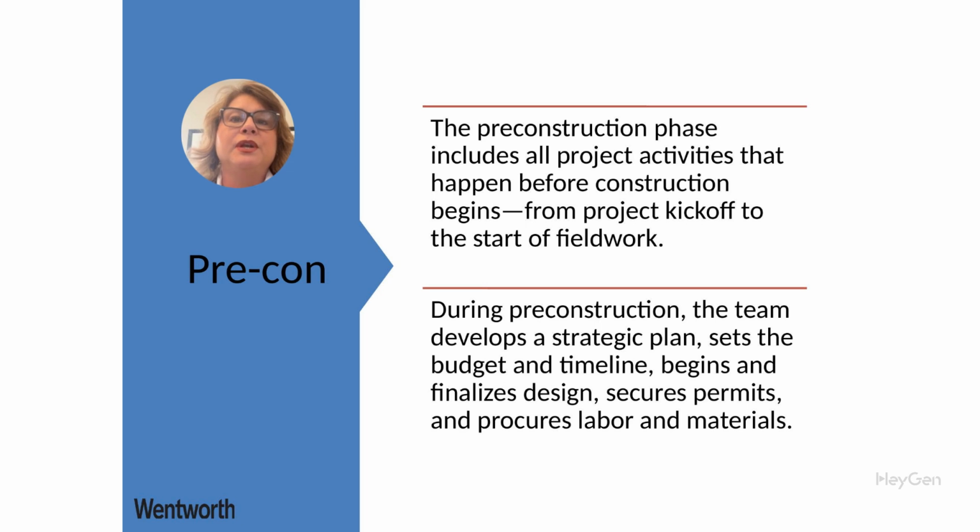Finally, we reach construction administration. The architect and contractor conduct site meetings, provide additional drawings as needed, and review final shop drawings. The punch list is created, and the project moves toward completion. Each phase builds on the one before it, and communication between the client and design team is key. From vision to execution, this process ensures both creativity and precision every step of the way.